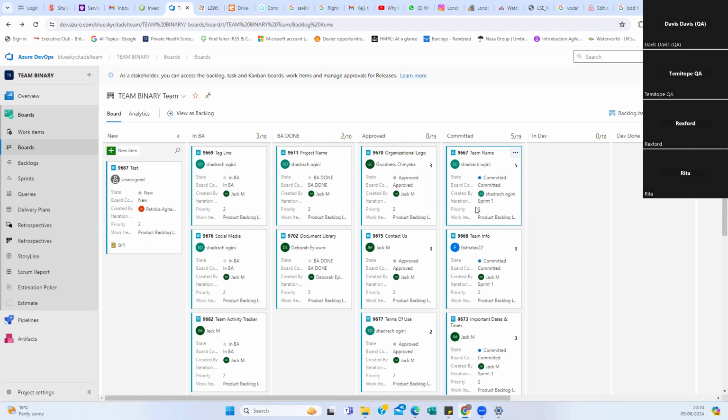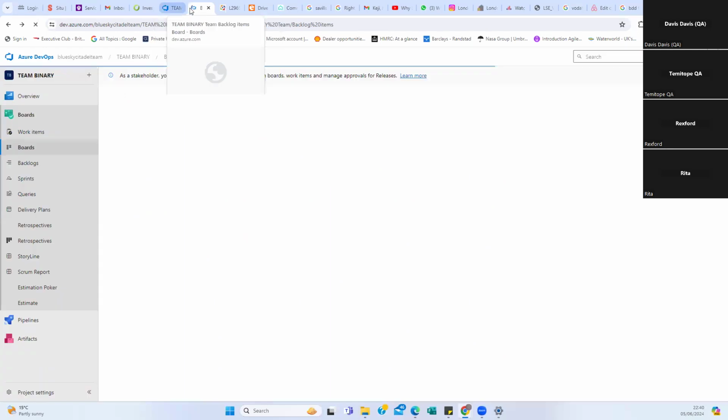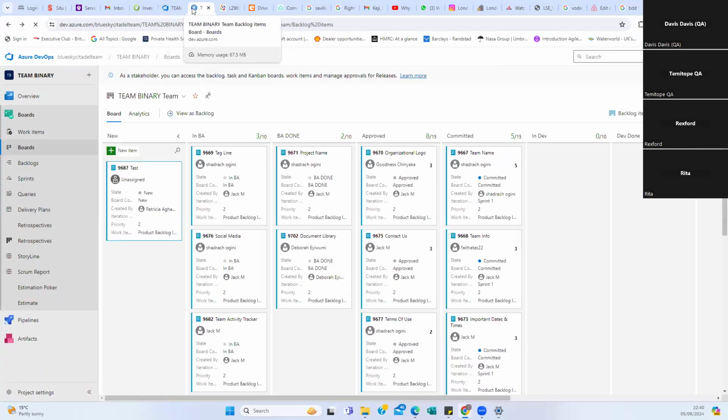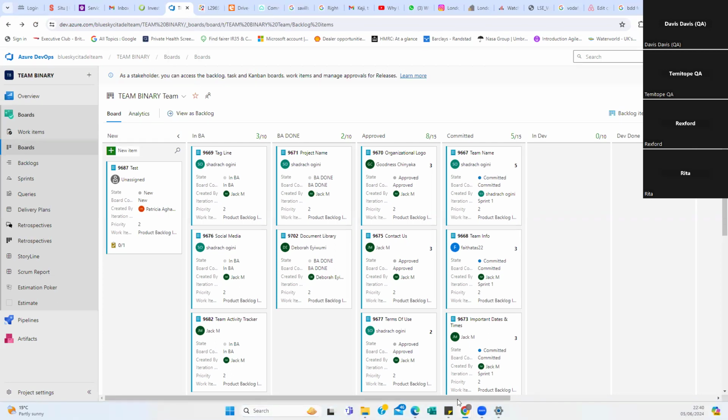But if you have created your test plan and you are just waiting for the environment for the features to be ready, it saves you time. So by the time the developer moves it to dev done, you have already executed in the same vein. So if you then find a bug, the developer might be able to fix that bug in that sprint, and that bug might not have to go into the next sprint.